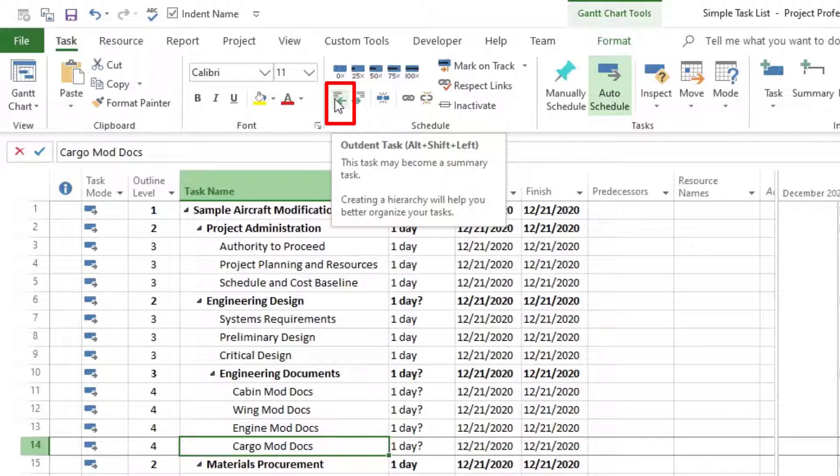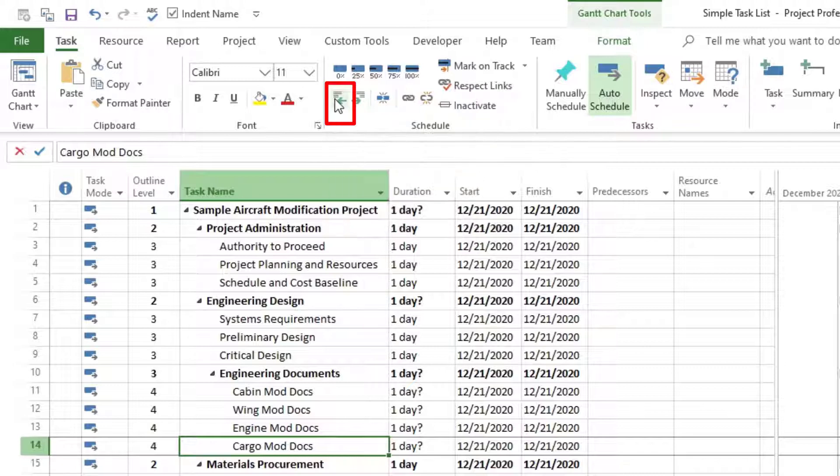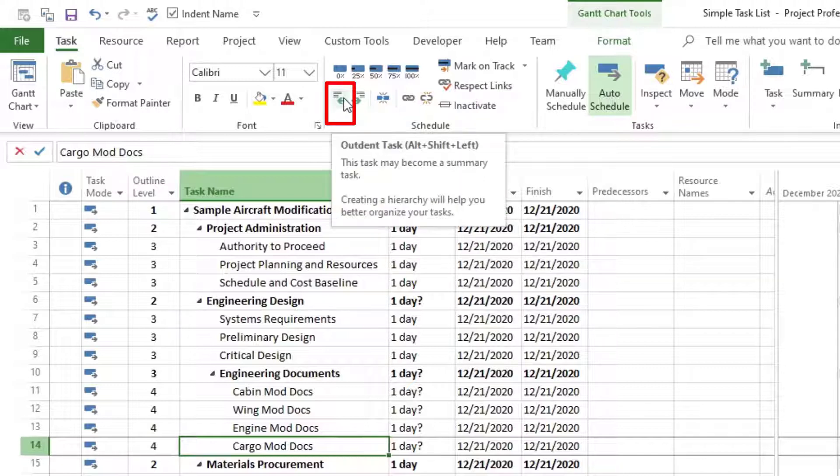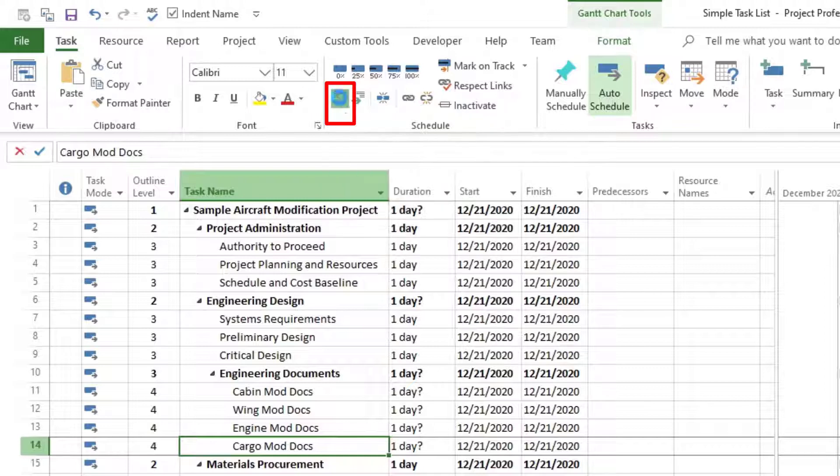This task may become a summary task, so you just need to be aware of that. And then creating a hierarchy will help you better organize your task. So that's what we're trying to do. So we're going to click on outdent. And you can see now that this task has become outdented.